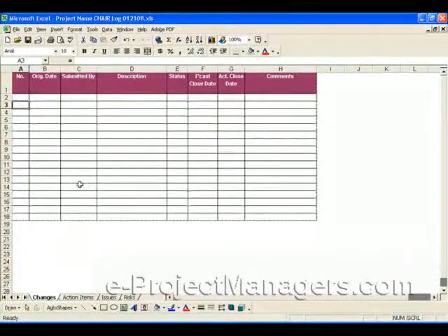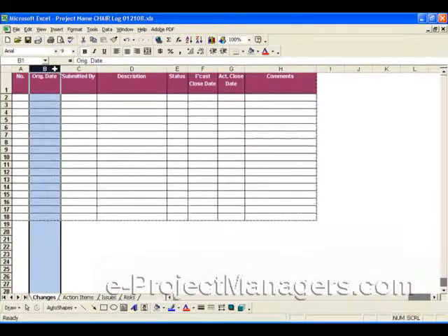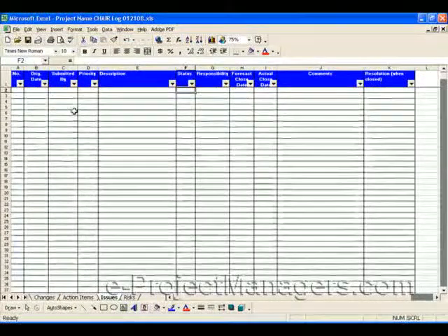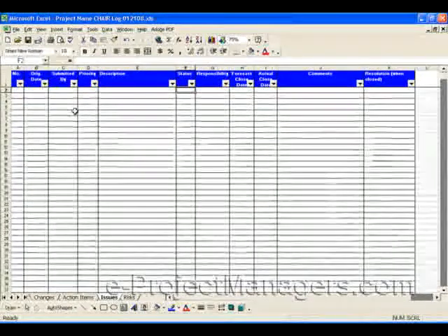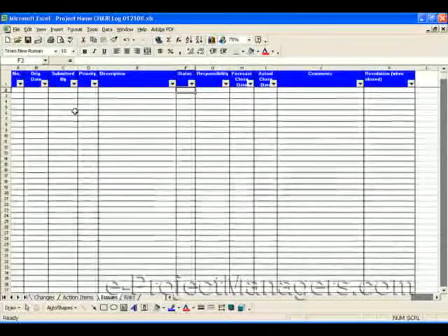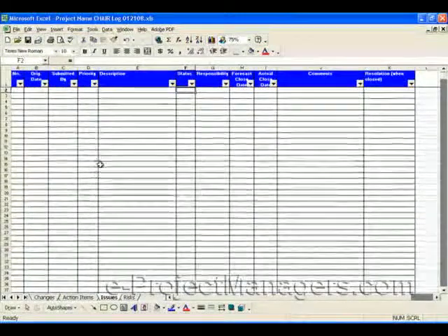Depending on who you're working with, one of the things I'll do is I sometimes add a column in my CHAIR log for the stakeholders. Like I'll make a category for whether it's a business change or a technical change or a business issue or a technical issue, and then I'll filter it so that when I'm in a status meeting with business people, they'll only see the business issues, risks or action items. And the same for technical, I'll filter it so they only see those. But you can have one log that you use for everything on your project.